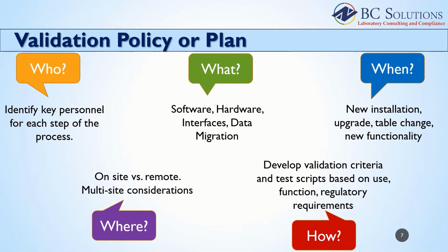What? List the pieces of the software or hardware that need validation. If you are unsure, ask yourself this: Is there a risk to patient, donor, business, regulatory compliance, or personnel if the software or device is not working as expected? If the answer is yes, validation is probably required. Always be sure the what is clearly defined.